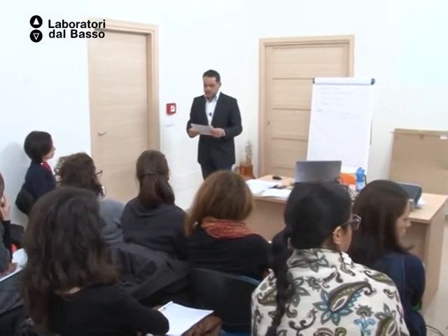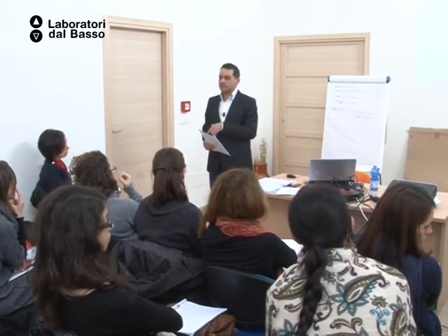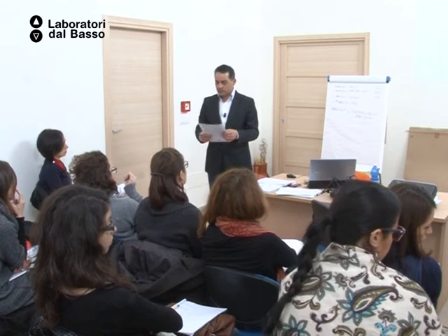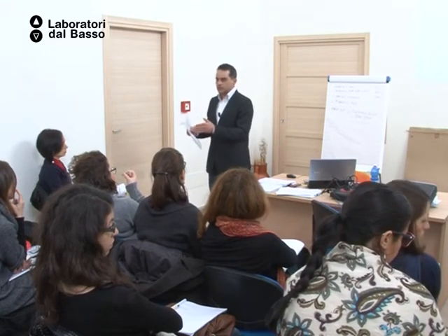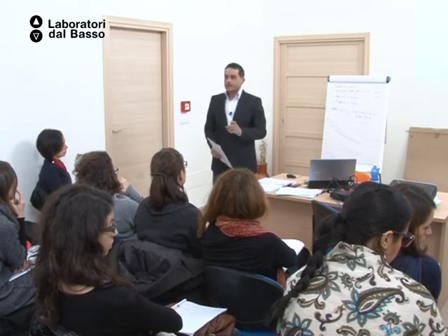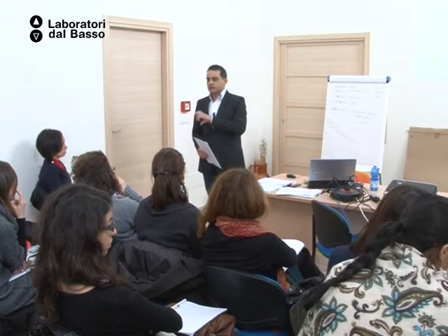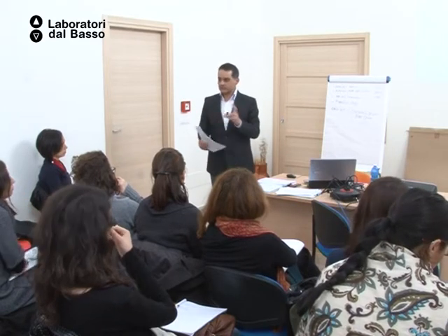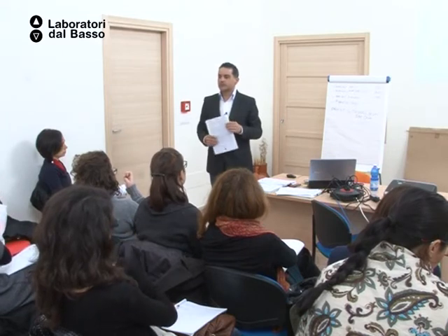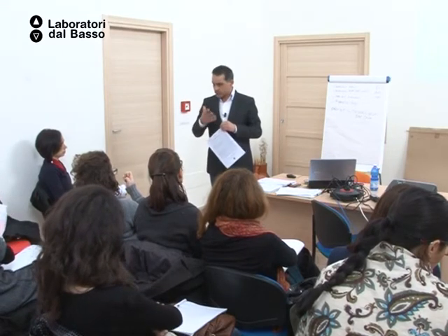So, blue is exclusively for the lifelong learning program eligible countries. Yellow is only for the third countries. You will understand then what applies to only one and what to only the other, because on the different framework countries, the eligible part is different. For example, subcontracting to a third country is not allowed, things like that.